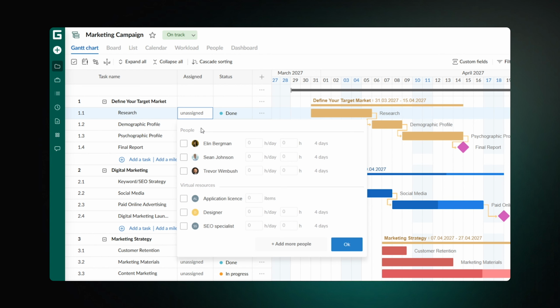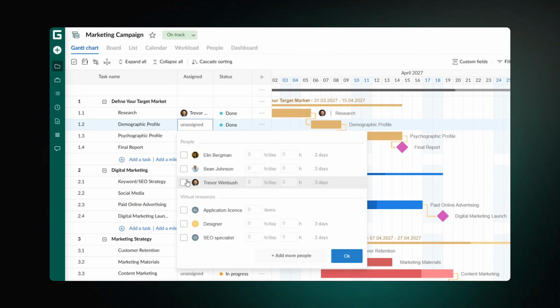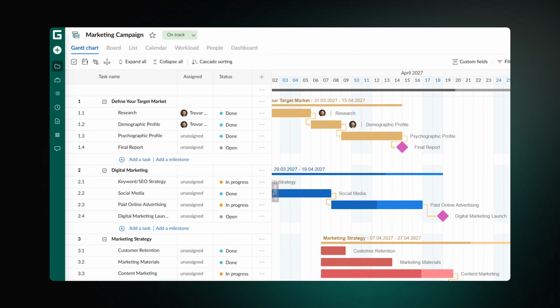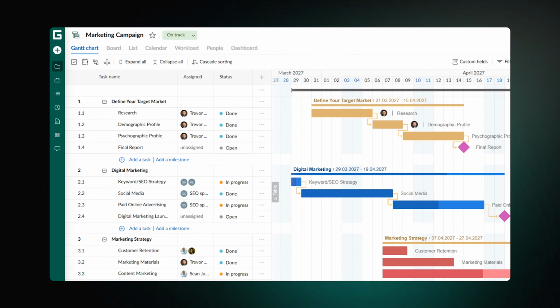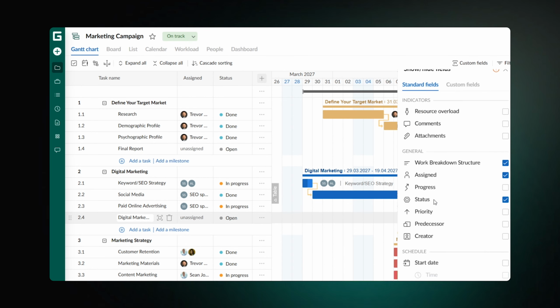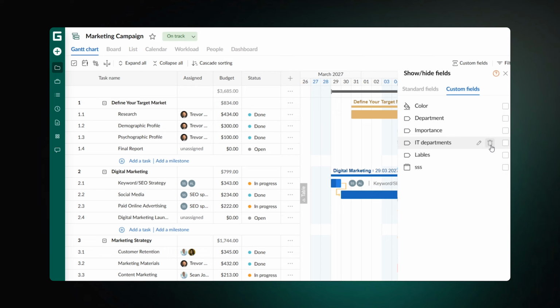And finally, let's assign each manageable part. A required team member will be responsible for a specific task. They will be involved in each section of work that will lead to the corresponding results. You can enhance your WBS and create a budget column to estimate expenditure, or enable other fields of your own choice.